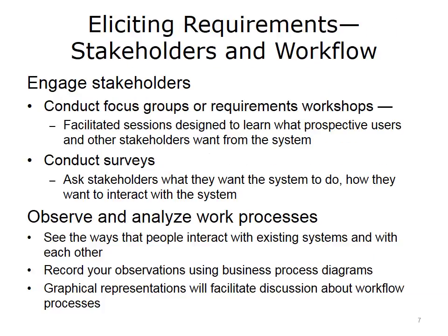Next, we will examine some techniques for eliciting requirements that involve engaging the stakeholders and observing and analyzing work processes. Consider these techniques to be part of your toolbox for understanding requirements on your projects. To engage stakeholders, the first technique is to conduct focus groups or requirements workshops in facilitated sessions that bring the stakeholders together. That way, they can hear each other, and there can be discussion and, ideally, some accommodation and resolution if issues exist about certain requirements on the project.